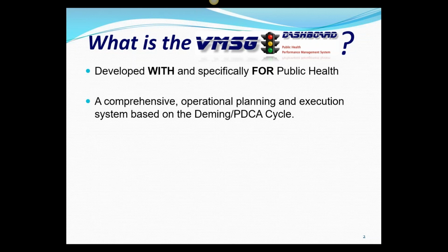The other thing we like to be able to do once we get to that level is continually go through this plan through what we call the PDCA cycle, plan, do, check, and adjust, or the Deming cycle, where we're going to continually move that plan forward and keep track of the real results versus the plan as we're moving forward. We're going to show you a live example of how that works in here.